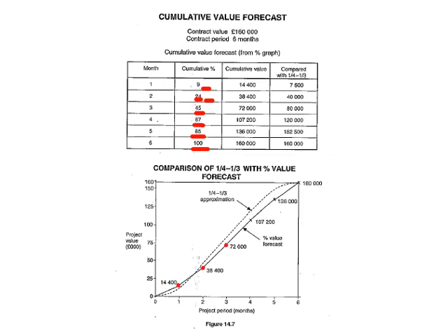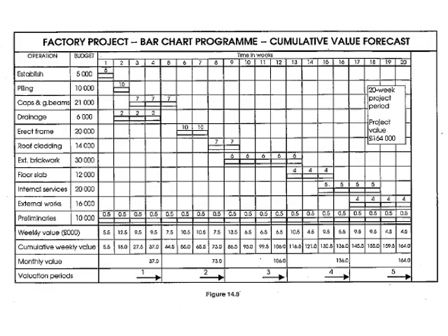expenditure on your graph, and you draw in your graph to get to your percentage spent, and you can see they actually put in the S-curve, and the S-curve is more or less in there, but you can see there is quite a bit of a difference. You can see more or less here in the middle is where you will have a big variance with regard to that. So you can see that you will have a lower cash flow or expenditure on a project than the S-curve would suggest. Okay, then you get to your bar chart